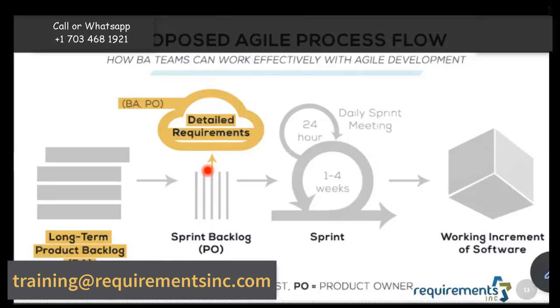Right. So each sprint, you want to be able to complete that box. So anything that is a month or anything that is over 2 weeks, because that is what we have selected, automatically gets split into multiple boxes, which means absolutely each of these should take at most probably a week, because you don't want an entire sprint to be on one product backlog item either. So the maximum an item should be is a few days to a week, no longer than that, right? So now you know how to split up the boxes.